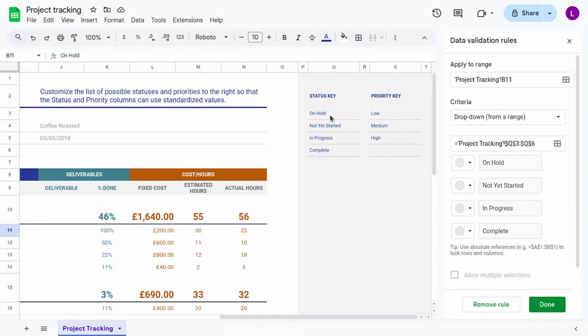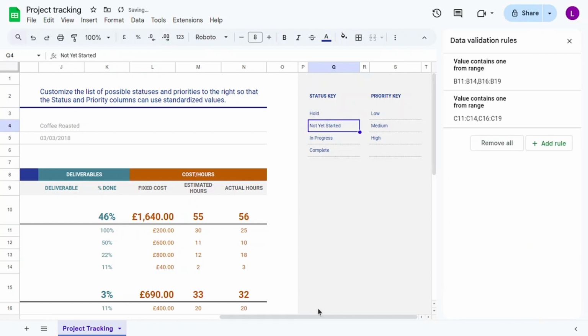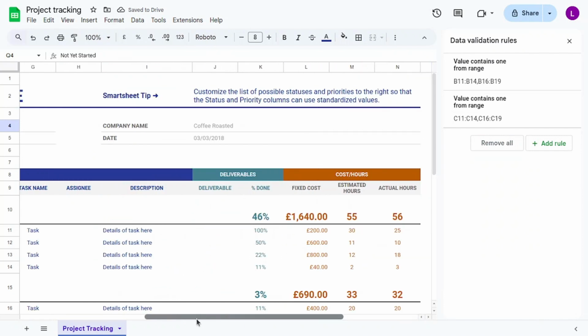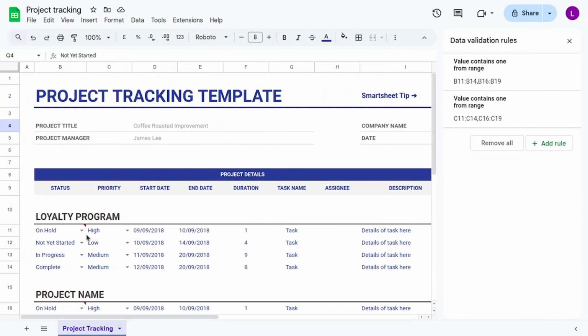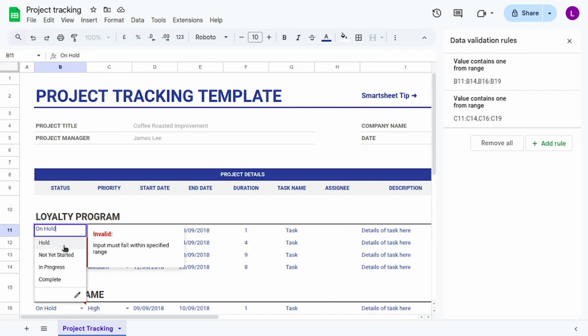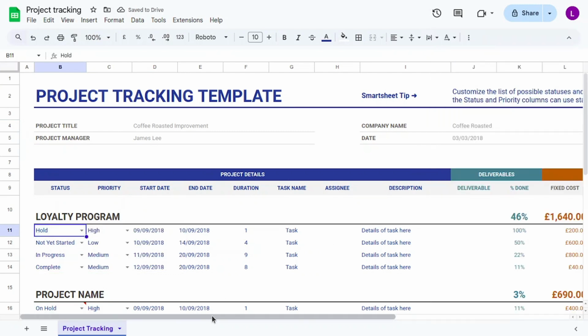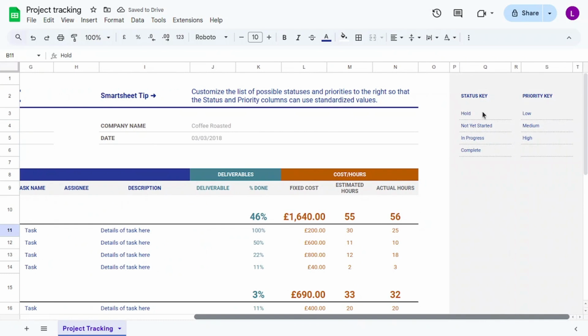Here, guys, you can add some conditional formatting to highlight overdue tasks automatically. You can select the end date column, click format, then of course conditional formatting. Also here, you can choose date is before today and set the color to red. So as you can see in this video, I am editing this part, and now if any task passes the deadline, it will turn red. This is a lifesaver for staying on track.